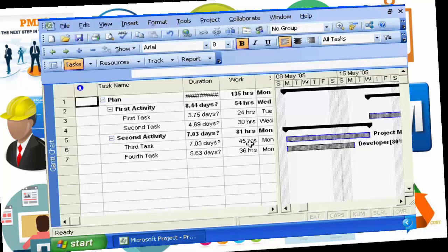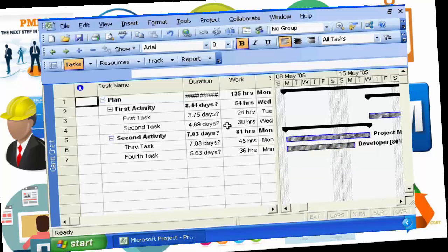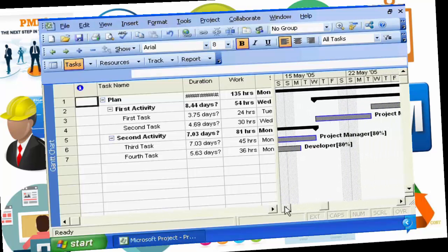It has 45 hours of estimate on it, so therefore I'm going to schedule that first, get it out of the way, so we can go on and do other project tasks. And then I'm going to look for your next hardest piece of work, which is this one at 30 hours, and then finally the remaining task at 24 hours. So that's why it did this rather unique approach to scheduling.